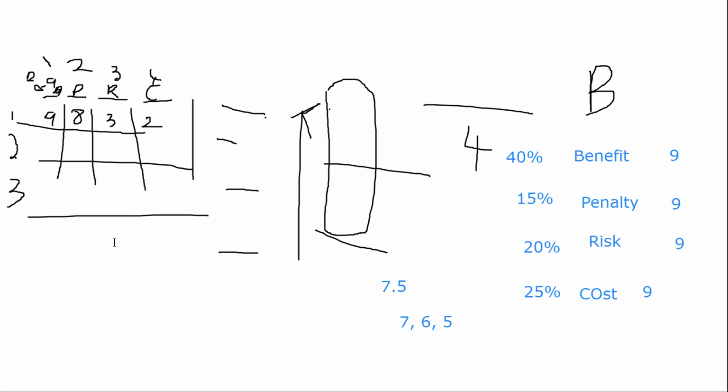Perfect. Kano analysis. Basically, we have satisfiers, which satisfy the users. Dissatisfiers. If these are not there, then the product cannot go. Let's say you want to buy movie tickets online and you come to my website, it doesn't have a payment facility, it doesn't have a booking facility. That's a big dissatisfier. You will never come to my website. A satisfier would be, if you have a feature to run the trailer at the movie level, that satisfies you, but it need not, because you can go to YouTube.